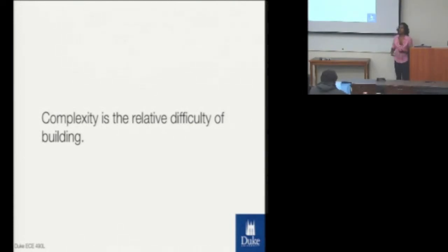So when we're trying to estimate and trying to create our product roadmap, one of the things we have to think about is what's the complexity involved? Not with the feature, but with each story. Okay? And what this is going to let us do, and you'll see when we talk about Sprintly, is it will actually let us get to some estimation of when the thing can be delivered. It's not perfect, right? People are obviously going to take more time or less time. People are going to get sick. There's going to be issues. But if we factor in the complexity, then we'll become better at estimating when something can be shipped.